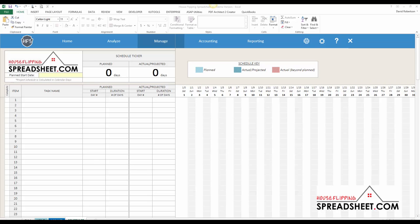The first task for setting up the project scheduler is to input the planned start date. The planned start date is the date that will be used as the starting point for the entire project schedule.